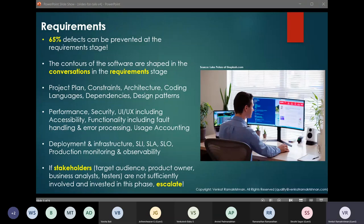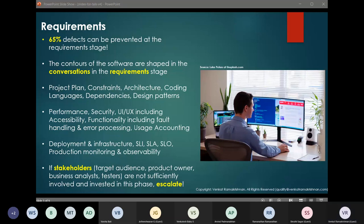Why is this the case? When we communicate with the business, we tend to assume or misunderstand what they want and build something they don't need. If we prevent this, significant cost and effort savings can be realized. Also, in a dynamically evolving product, requirements do change, and when changes happen it is important to keep them documented formally. There are several facets of the product that get affected because of requirements change: project plan, constraints, architecture, coding languages, dependencies between modules, performance, security, deployment considerations, infrastructure, etc.